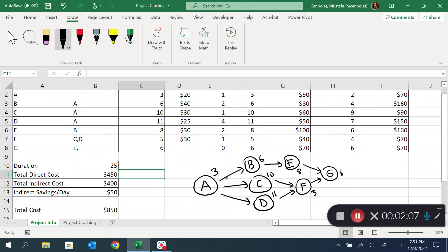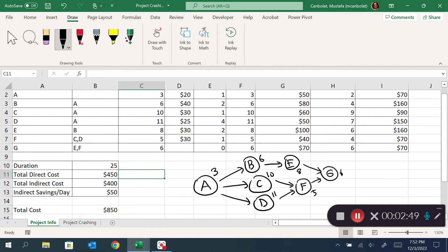Looking at every path, A-B-E-G adds up to 3+6+8+6 = 23. A-C-F-G is 3+10+5+6 = 24. A-D-F-G is 3+11+5+6 = 25. Since A-D-F-G is the longest, while that path is being processed B, C, and E are also done at the same time, so the project duration is not extended by those shorter paths.